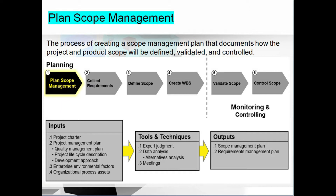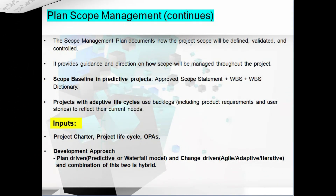The key inputs for this process are the project charter, the project life cycle, and OPAs — organizational process assets. The project charter includes a high-level description of the project, service, or result, while the project life cycle breaks the project into different phases. We can also use old project history records and lessons learned for planning efforts. Every project has a development approach: plan-driven (predictive/waterfall), change-driven (agile/adaptive/iterative), or a combination of both (hybrid).